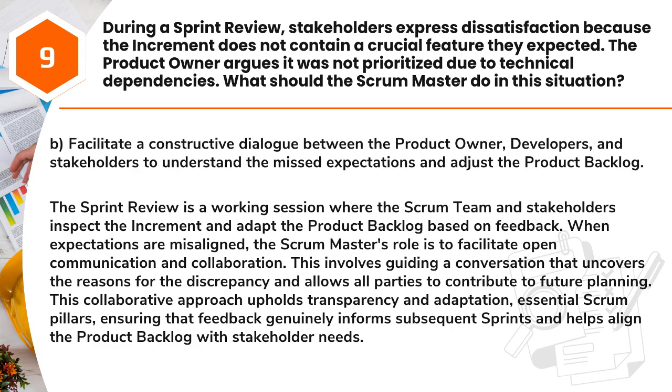Answer: B. Facilitate a constructive dialogue between the product owner, developers, and stakeholders to understand the missed expectations and adjust the product backlog. The sprint review is a working session where the Scrum team and stakeholders inspect the increment and adapt the product backlog based on feedback. When expectations are misaligned, the Scrum Master's role is to facilitate open communication and collaboration.